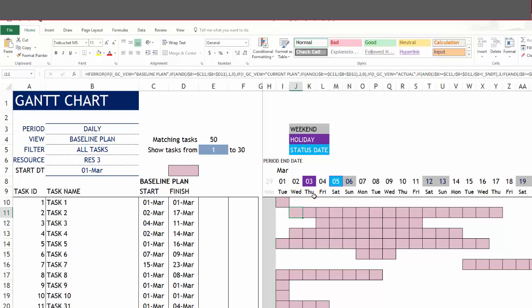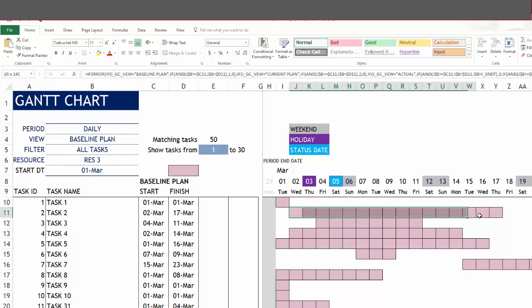But keep in mind that it doesn't mean that the task is scheduled for every day in between. For example, third March is a holiday. So no work may be scheduled on that day, but still it is shown in the pink color. That is because the purpose of the Gantt bar is to represent the entire duration of the task.